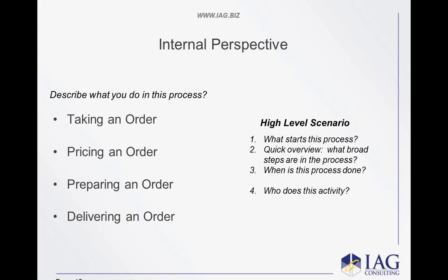Should budgets be a factor to discuss at this point in the project, Francis? I wouldn't do that, because you've got no idea how big it is until they start going in and describing these things. People might say there is a constraint on this project, that I can only spend this amount, but it's the business that would constrain it, not IT telling people how big this thing is.